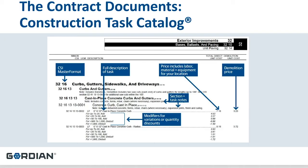The tasks in the book represent the scope of work for the contract. The CTC is laid out in a logical way and easy to navigate. Every line item has a line item number, a description, a unit of measure, and a unit price for installation and demolition. Many line items also have modifiers — this is how a contractor can account for different hardware packages, whether chrome, brass, or satin finish. Modifiers are extremely important throughout the CTC; do not miss those when putting together a proposal.